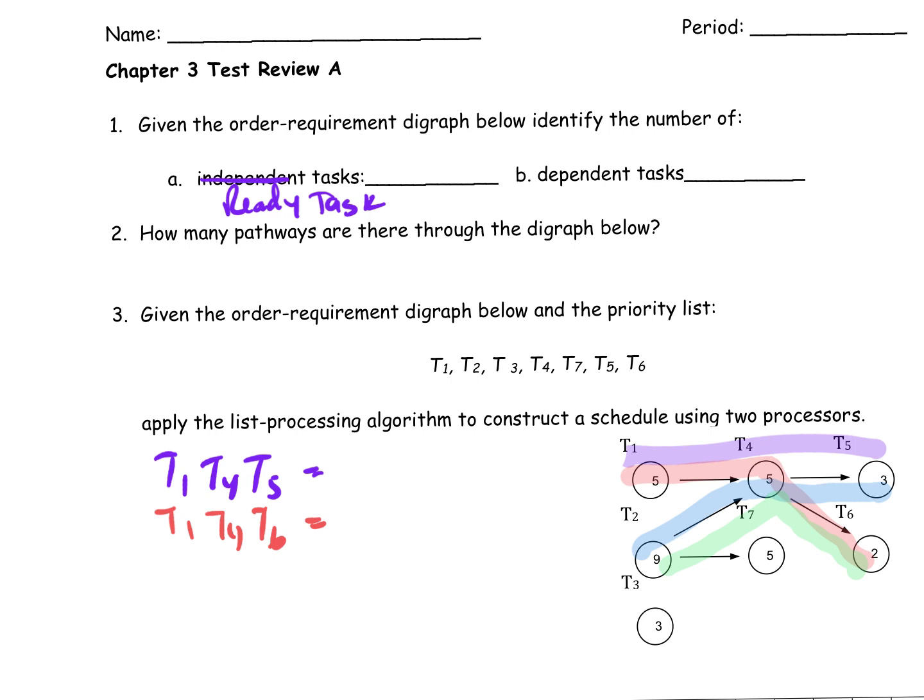It's ready to process. In this diagraph, I've got three ready tasks. So then how many of these tasks are dependent? Four. There are four left. So there's seven total. Your ready tasks and your independent tasks should add up to seven.